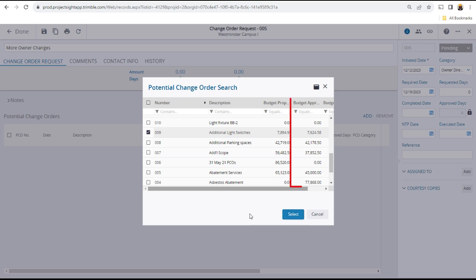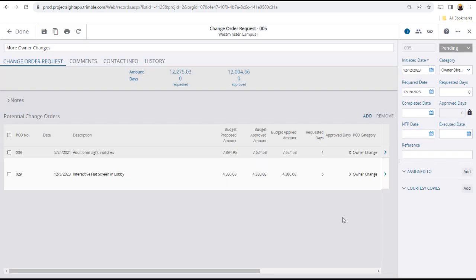Note that only approved budget amounts will carry over to the change order request. When you have chosen your PCOs, click select to add them to the change order request.